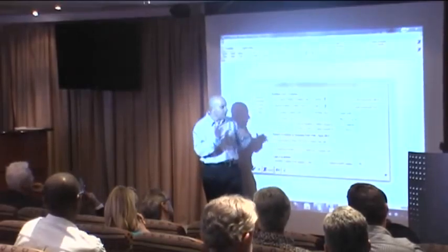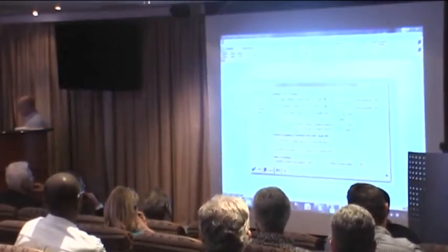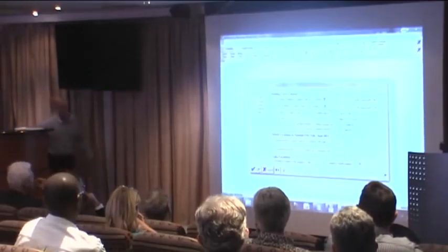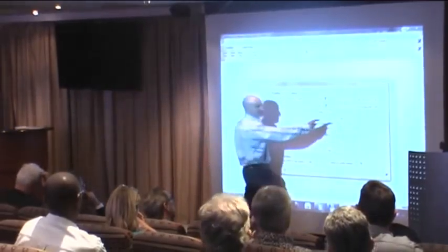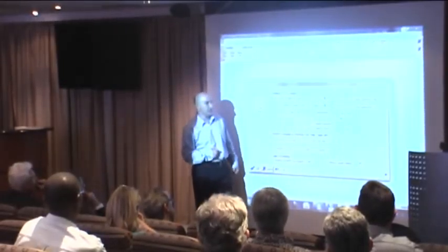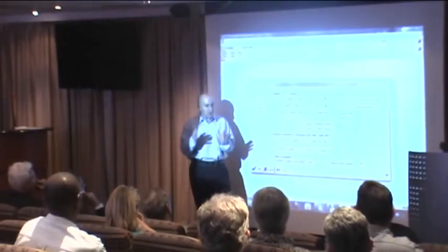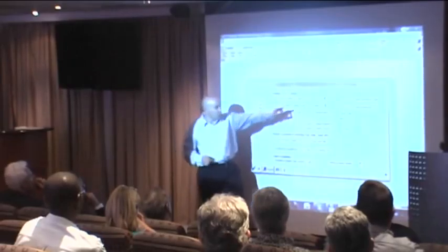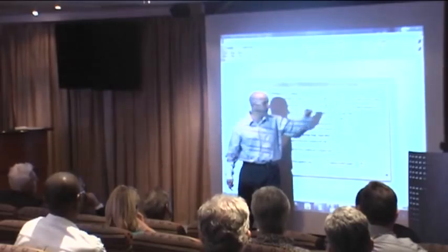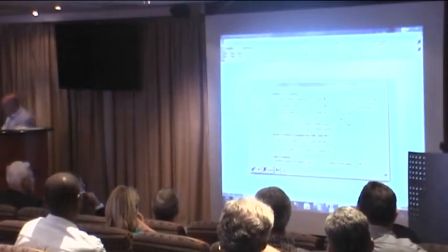So that's purely just manipulating cash flows in order to generate a total cash flow. And what's interesting is another feature here is it projects. So it's saying to you, what you should be using is a monthly pre-contract escalation rate of 0.46. So in other words, the system is checking how long is your project. Based on your project, you should be using 0.46% per month and 0.64% for your contract escalation. Whether you choose to use those rates is your choice. Click OK.